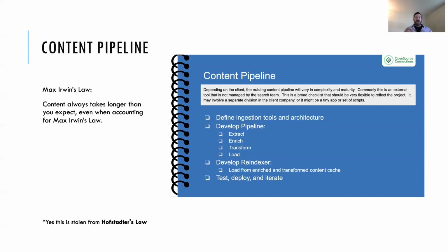So all these little issues start to pop up, and when you're integrating content into a configured system, also as you're evolving the configuration of that system to handle this content, things can take longer than you expect. So just take your estimate on the content and provide a reasonable buffer for things that will probably pop up that you didn't see coming. And the more analysis you do up front as you can afford for content before you do your overall migration estimate, the better.